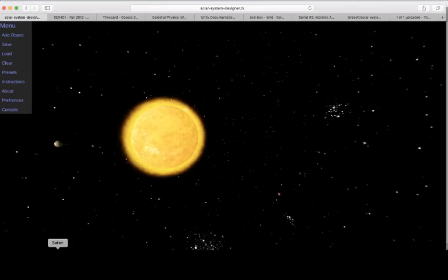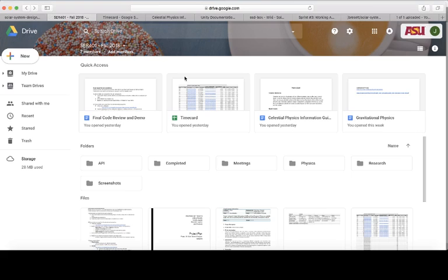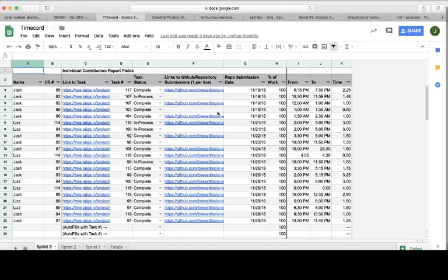Now we're going to jump into some of our artifacts here. We have our GitHub account, pretty organized in different file sections. We have this time card artifact in our GitHub. This is Google Drive, with time stamps of how long it took us to complete certain tasks, and we're going to use that information in order to better set up the next sprints and to better adjust the user story points.